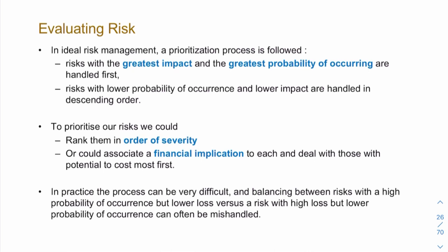So remember, we said we need to identify risk, then we need to quantify risk, then we need to evaluate risk. And part of risk evaluation is prioritization. And prioritization is what we were just talking about, ranking. So looking at risks with the greatest impact, or looking at risks with the greatest severity, and dealing with those first, or assigning greater resources to deal with the more severe risk.